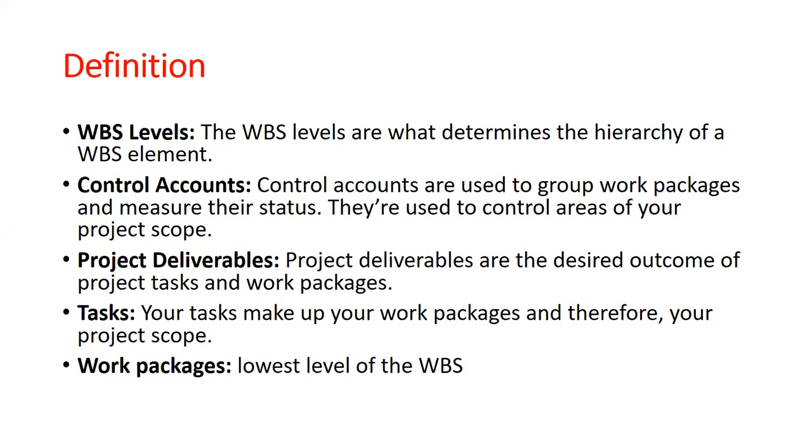Your tasks make up your work packages and therefore the project scope. Your work packages are the lowest level of the WBS. So if you want to create a WBS, first of all, you have to break it down into phases. From a phase, you break it down into tasks. And then from the tasks, you have your WBS. Okay.